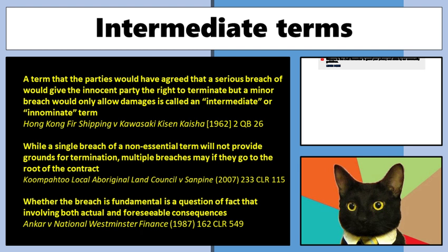All right, so that's just something to make note, that if somebody is late by 5 minutes every single day, each one of those is only going to be a warranty. You're probably not going to get much money for it. But if they're 15 minutes late one day, 10 minutes late the next, 15 minutes late after, even if those things are a breach of warranties, collectively, and again, going back to that thing for you guys taking notes, make sure everything's written down, collectively that can actually give the other side the right to terminate.